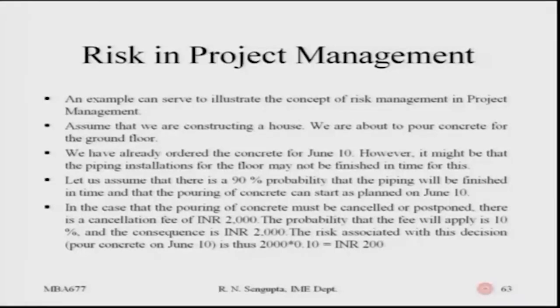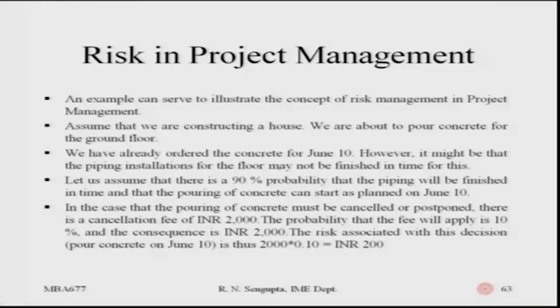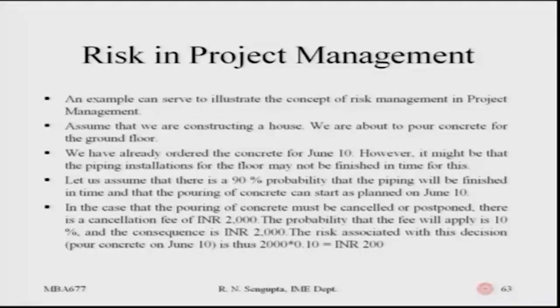Continuing with the concrete pouring example, there is a ninety percent probability as mentioned. In case the pouring must be cancelled or postponed — due to the cement mixing machine not working, cement not arriving on time, base work not finished, or the worker being sick — there is a cancellation fee of Indian Rupees two thousand. So if it is delayed by one day, there is an extra cost of two thousand rupees. The probability that the fee will apply is ten percent, since there is a ninety percent chance it will finish and ten percent it would not.